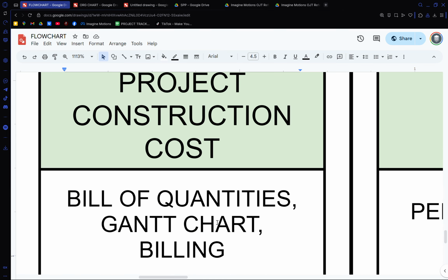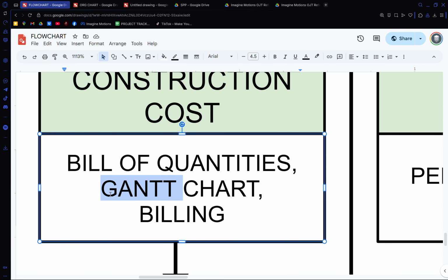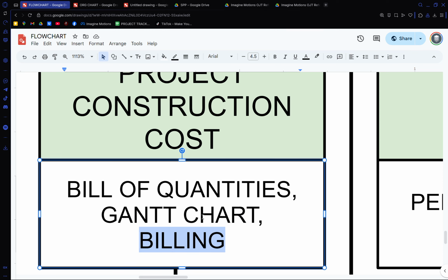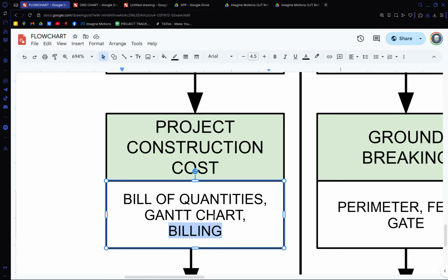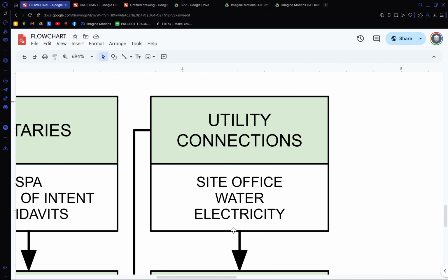And then now you can be the one to finalize the BOQ. The Gantt chart, Kate, is what I'm asking for. Billing also. So you need forms. You need to make forms for these because you're starting to apply for the building permit. And the building permit also states the schedule of construction and end of construction, not only for the building, but even the electrical and plumbing. Now that you have the building permit from all 4 LGUs, you can start talking about construction.